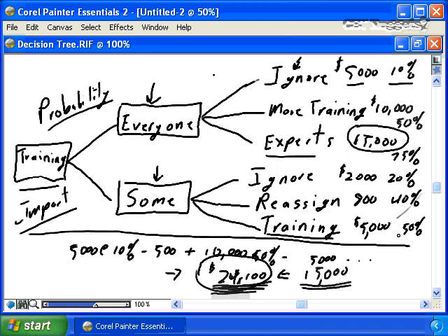You need to ensure you have sufficient contingency in hand to deal with this risk should it happen on your project. But, and this is the big but, you also need to ensure that you're not building in so much contingency that this number is so conservative that the acceptors are not going to accept the overall project budget, that the project is going to be priced at an unreasonable level, that management and the business is going to say, well, if the project is really going to cost $15 billion, there's no way we're going to take on the project. And I say that with extreme.